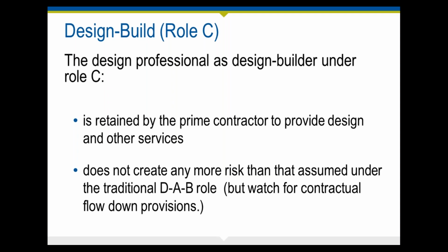But you have to be wary of flow down provisions in the design builder AE agreement, because if indeed the design builder has certain obligations to the owner and they're flowing all of them down, then those warranty and guarantee obligations certainly exceed those normally undertaken by a design firm. So be wary of warranty obligations and be wary of broad indemnity obligations that the design builder may seek to flow down to you.